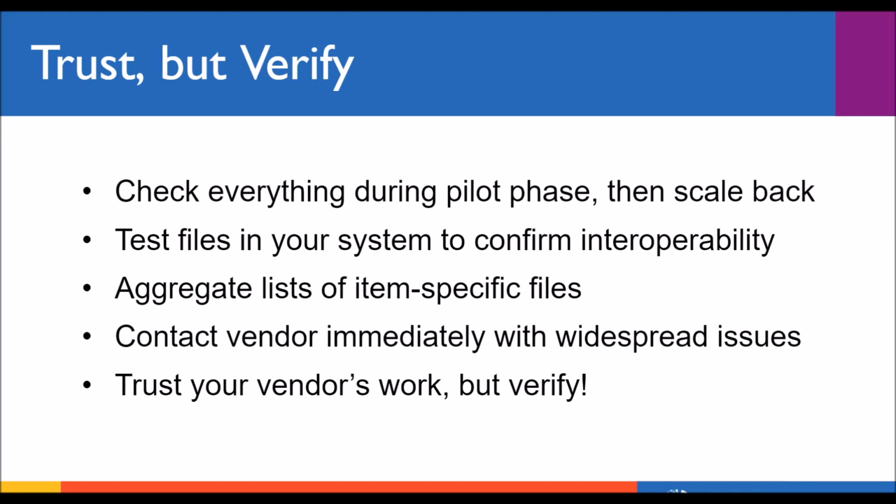But the files that you do check should be a balance of both objective, such as file names, file deliverables matching your specifications, and subjective, such as whether the quality is sufficient and whether the content matches the metadata. Now, depending on the size of your project, you may also want to utilize some automated tools to help with QC, but this is a fairly manual process.